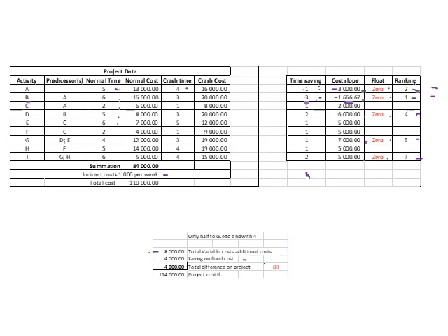And then what I've done here is I've just calculated the added amount and the reduced amount, and indicated that we've got a cost difference of 4,000 Rand, which is an addition to our 110,000 that we had here, and we get to 114,000. You can also use the steps that were shown in the book as well. So that is more or less how you do it. If you do it systematically and you just draw the tables and add them together, then it's really straightforward to get to the conclusion.